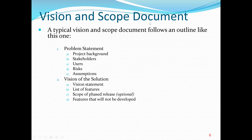A typical vision and scope document follows an outline like the following. First, we have the problem statement, which may include the project background, a list of all stakeholders, the users, risks involved, and assumptions. Then the vision of the solution includes a vision statement, a list of features needed to achieve the vision, the scope of the phase release as an option, and features that will not be developed.